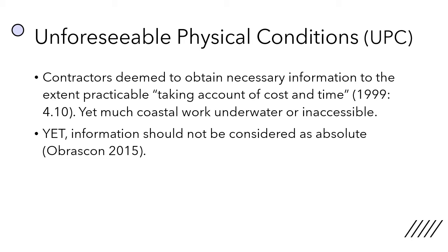Yet the information should not be considered as absolute. In Obrascon 2015, the court deemed the contractor should have foreseen the amount of contaminated soil, even though the employer had provided environmental statements. And the judge reiterated that an environmental statement contained statements of opinion, and they were non-binding on the contractor. The contractor was deemed at fault because they were required to do their own studies and so on.